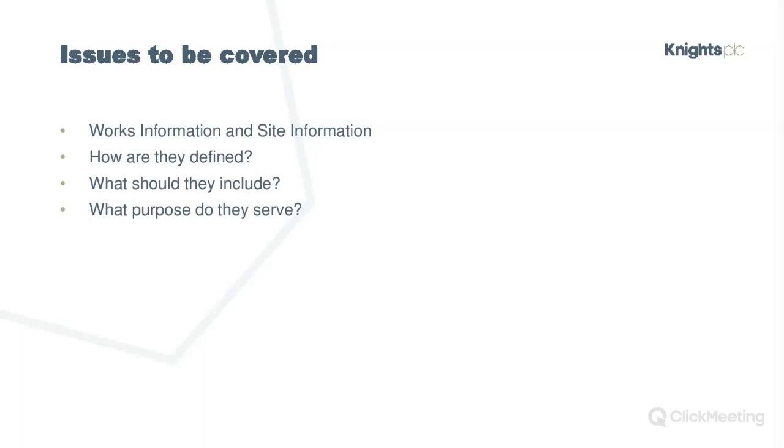I've also got the contract data parts 1 and 2. So they're the bits that are filled in. Project-specific information like, how much are the delay damages, what's the start date, what's the completion date, how much insurance is required, things like that. But again, often ties in with works information in particular, and other parts of the contract. And also, let's remember, we either have a programme in the contract, which is the accepted programme, or hopefully we have one shortly after the works start.